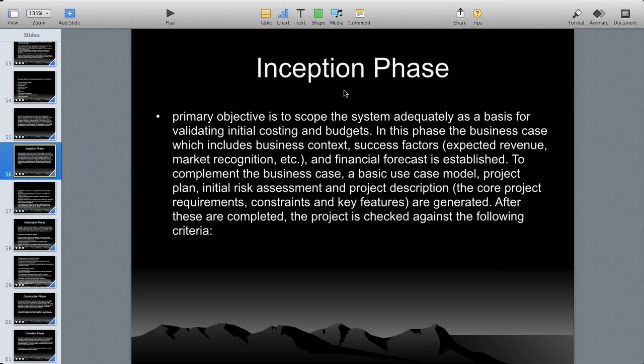And the third, there are so many reasons, because of unexpected situations, the time is not sufficient. At the same time, the project manager expected to get a business analyst for 60,000 per month, but the market is very good, there are plenty of jobs and very high competition for employees. Then you have to pay 1 lakh per month for a business analyst. Are you following what I'm saying? I'm talking about labor expenses and infrastructure expenses.